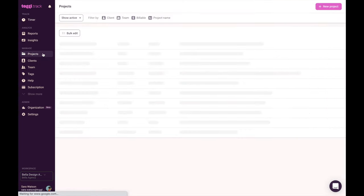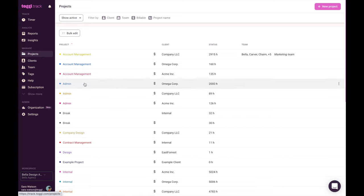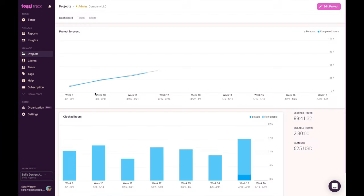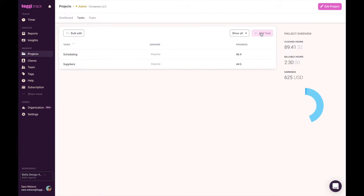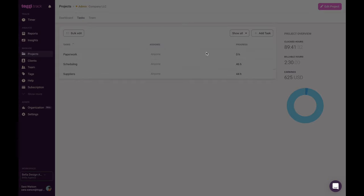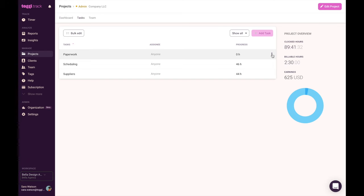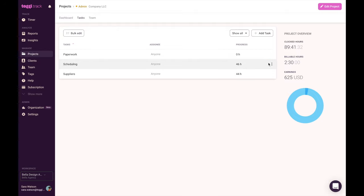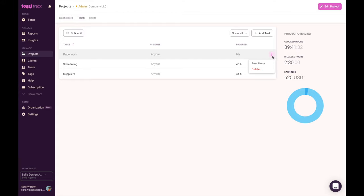Open the project under which you want to create tasks and click on the task tab. Click add tasks to create new tasks and then click on save to confirm. To hide completed tasks from the project list on your timer page, you can mark a task as done. Entries recorded under your done task will still be available in reports. A task can be reactivated by marking it active again.